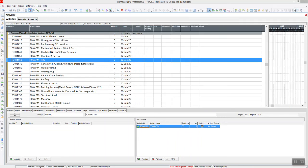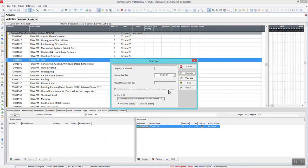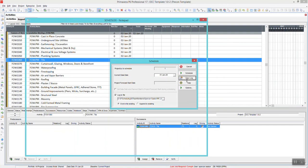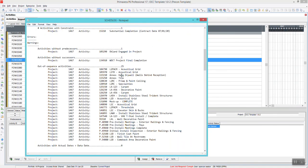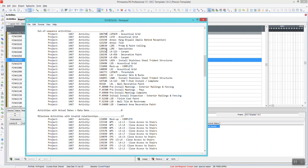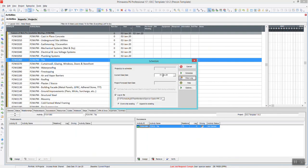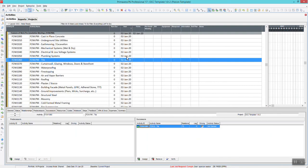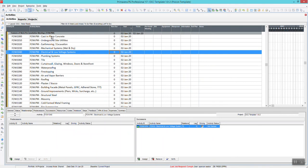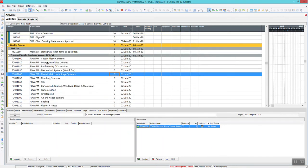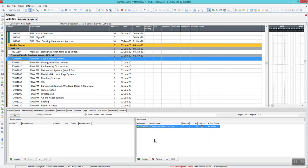So if you are using the Log or something like that, if I go to my View Log and I have 25 activities out of sequence, you can highlight this and copy, and then you can paste it into your Find Function. And it will take you to that issue to be able to check and edit.